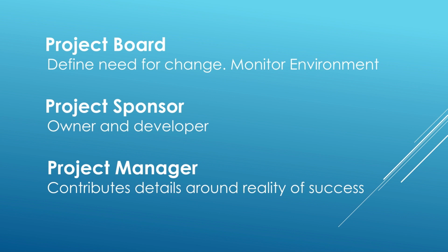The project sponsor, who is a member of that project board and the one identified to take forward the idea, this need for change, is effectively the owner of that business case, and they will be taking that forward to develop it. That does not necessarily mean that they are writing the entire business case, but they are responsible for making sure that it is written, it is complete, and it is as accurate as possible. One person in control of that document.